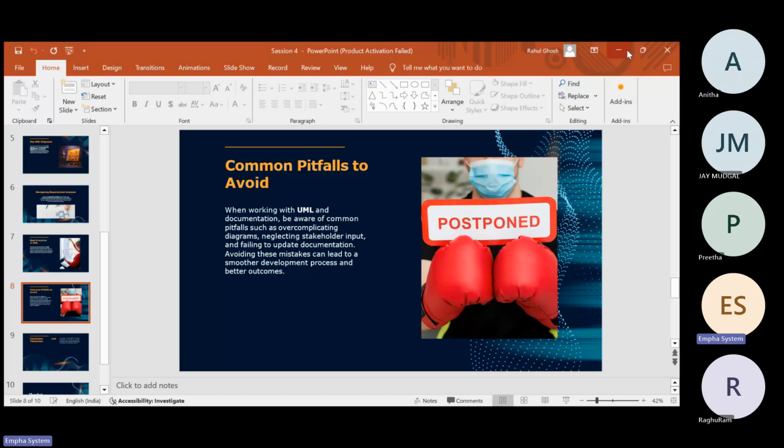Yes, absolutely correct. The first thing is the business requirement. Of course, as I mentioned, we have associated documents with them. The business requirement has a document called the BRD, the business requirement document. The functional requirement also has an associated document, the FRD, the functional requirement document. The next is the software requirement specification document, the SRS. Let me explain one by one what these documents are. As I mentioned, we have three pillars of requirements, and in the same way we have three pillars of documentation.